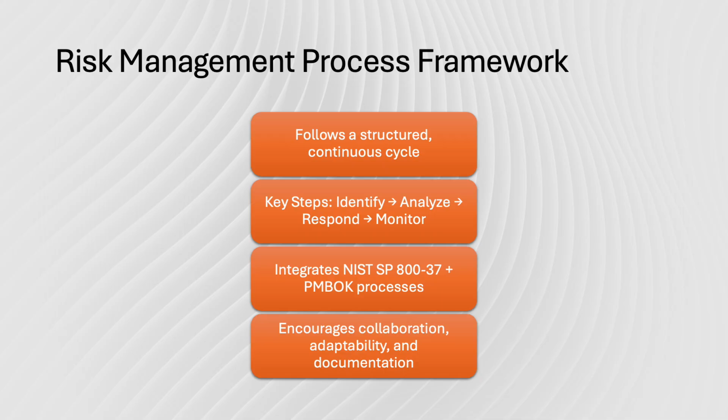NIST's framework reinforces this through its continuous monitoring step, ensuring that risk management remains a living process rather than a static document. For our project, this might include ongoing reviews of phishing test results, employee compliance scores, and incident reports to determine whether additional mitigation actions are necessary. Monitoring also includes identifying emerging risks such as new cybersecurity threats or organizational changes and updating the risk register accordingly.